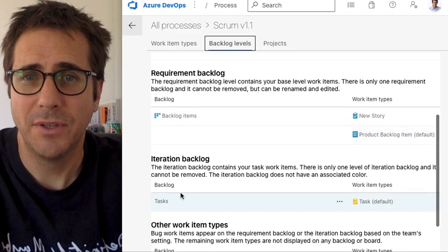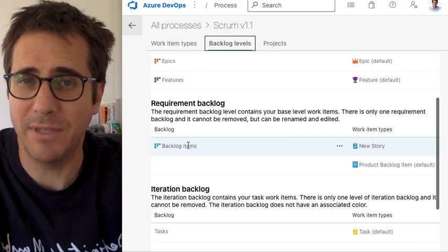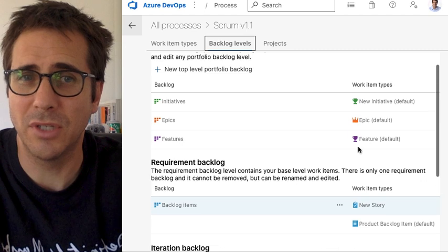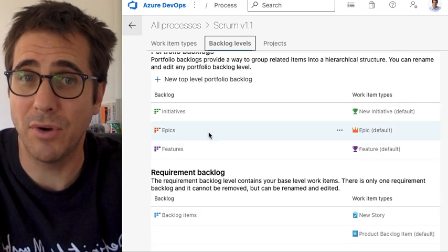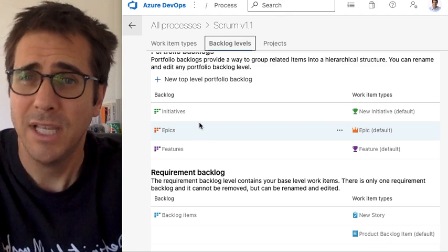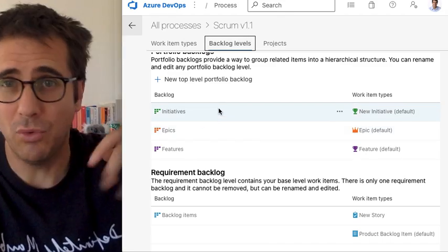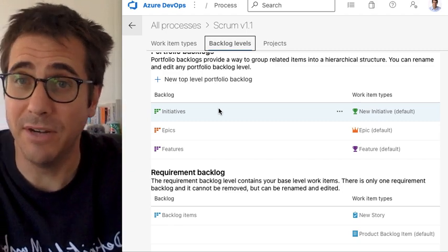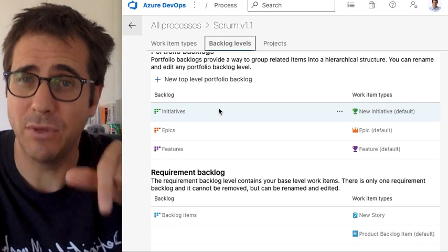We start down at the bottom, the personal backlog, the tasks. Then we've got this requirements backlog. They're the stories. They're the things that are going to go into the sprints. And then above that, we have the feature backlog, which belongs to the program, epics, which belongs to the portfolio. And on this one, not a SAFe thing, we have initiatives to wrap all of those epics in. Generally, not agile. That's related to funding. You generally have those for funding.